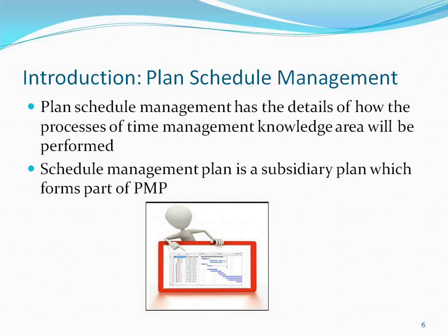Units of measure, like staff hours, staff days, weeks. How do you calculate? How are you going to do the project management related to the schedule? Is it in hours? If the project is say 10 years schedule, there is no logic in calculating in hours. Better you do it in days or weeks. If your project is very short stint, then you have to do it in hours. So these things you will plan upfront.